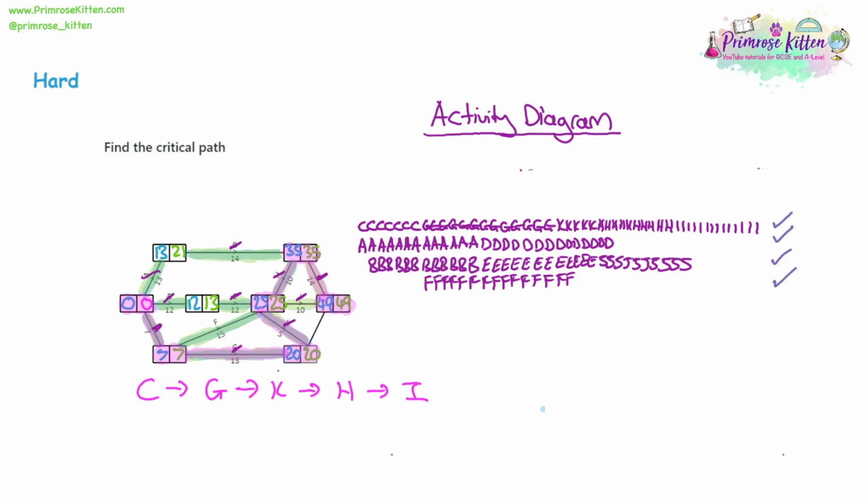And there may be multiple answers for this. So again, the As and the Ds could shift forward by 7 places, for example. So there will be a range of answers for these diagrams. But the important thing is that if it requires 4 employees, you can't go over 4. You've got to try and fit everything in.